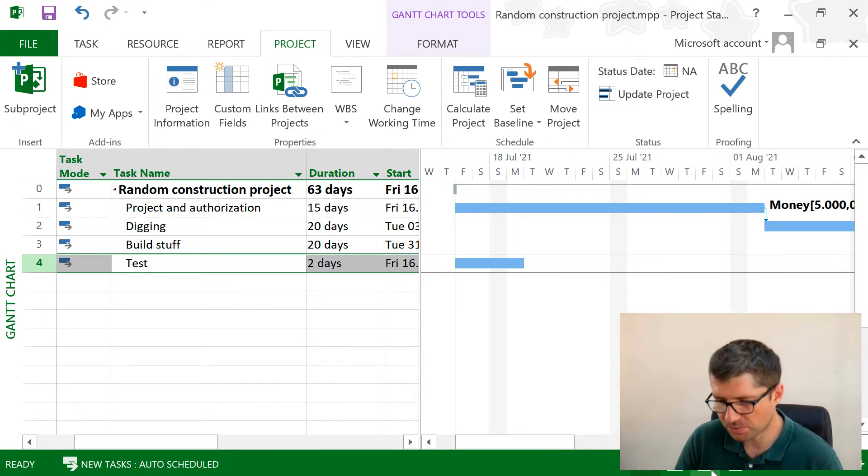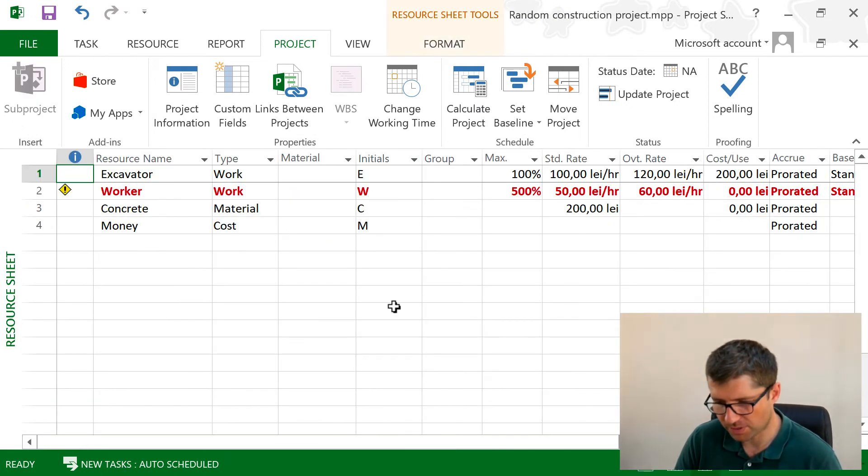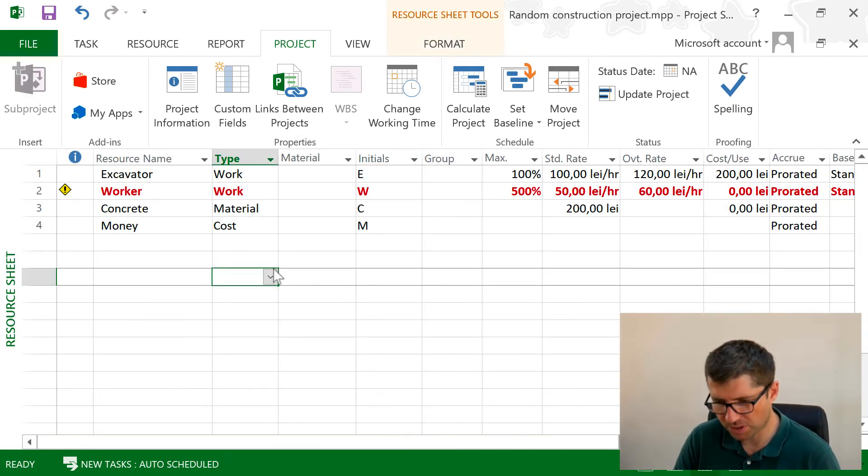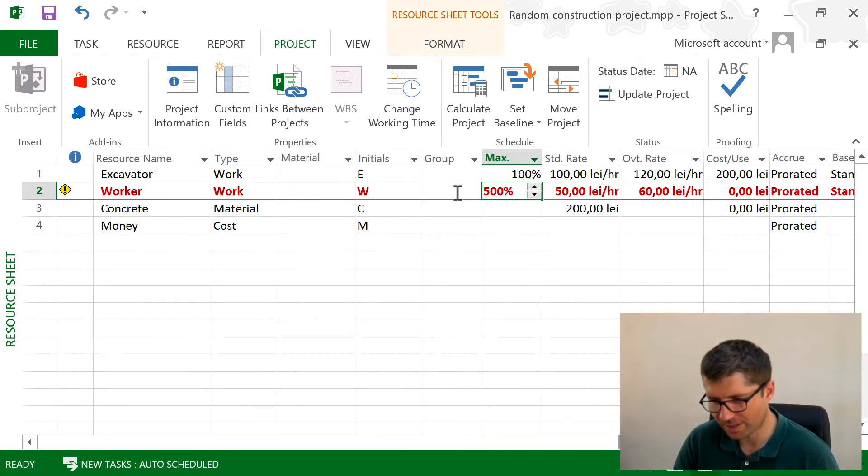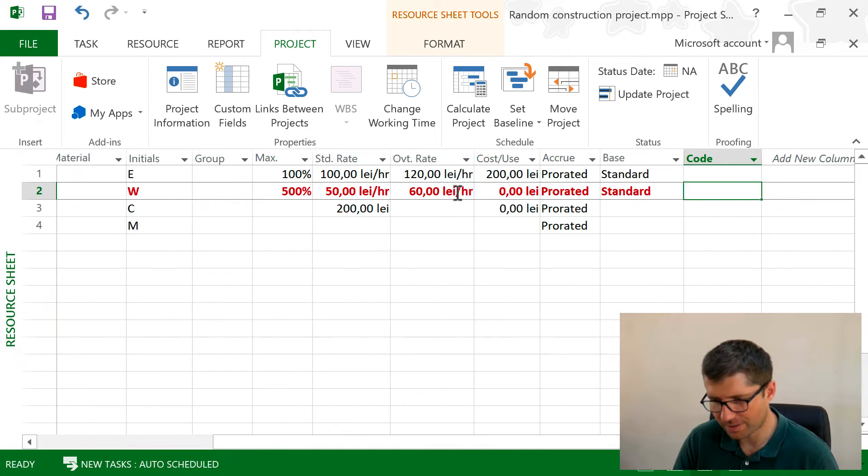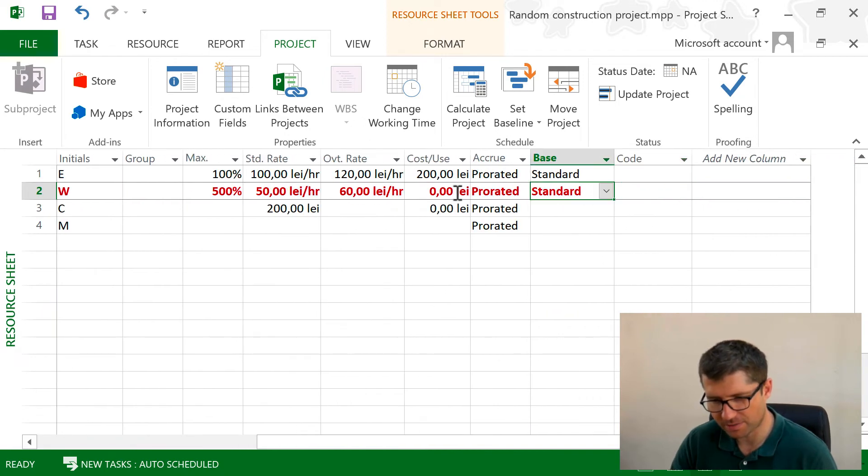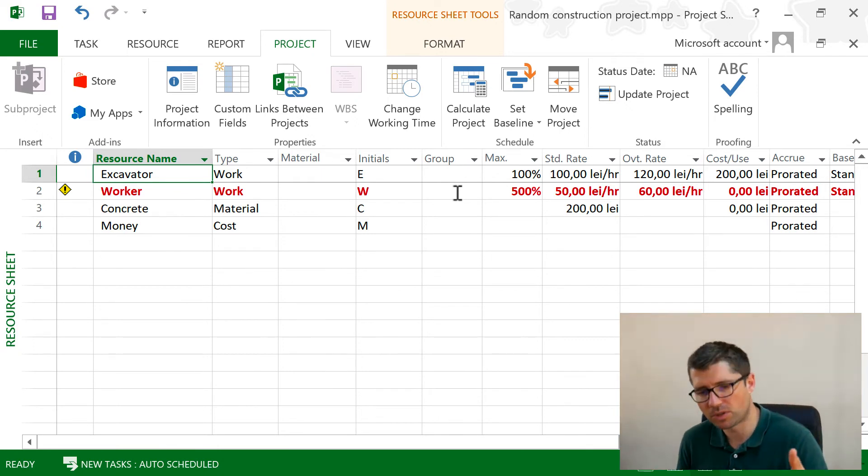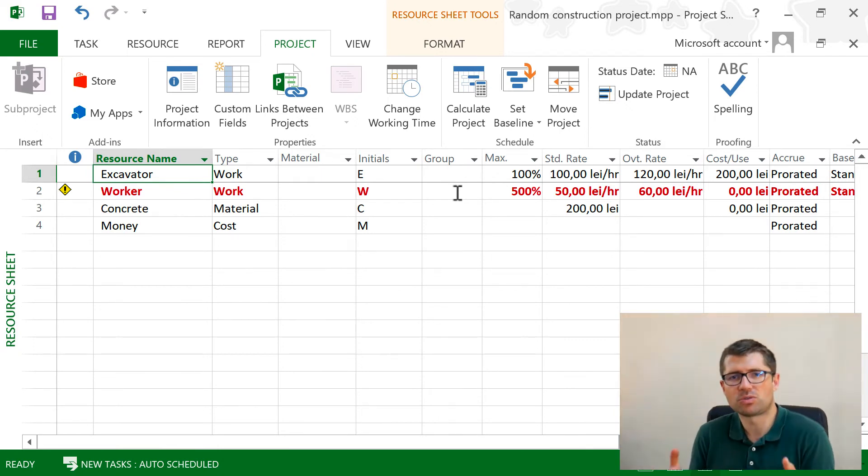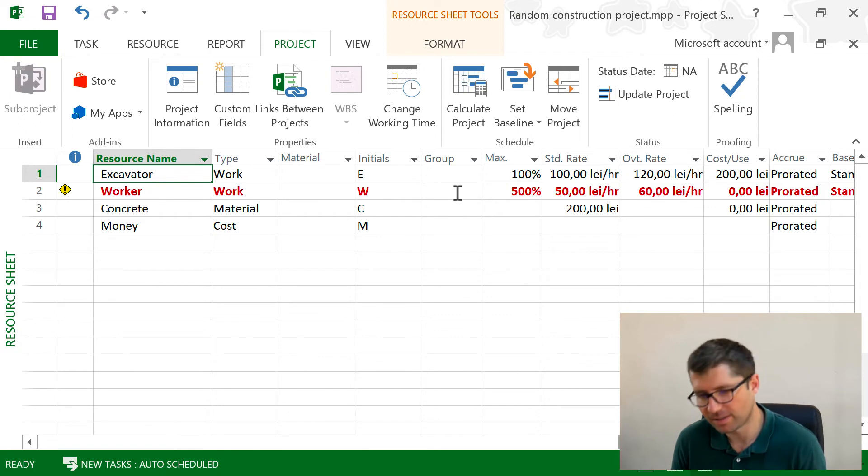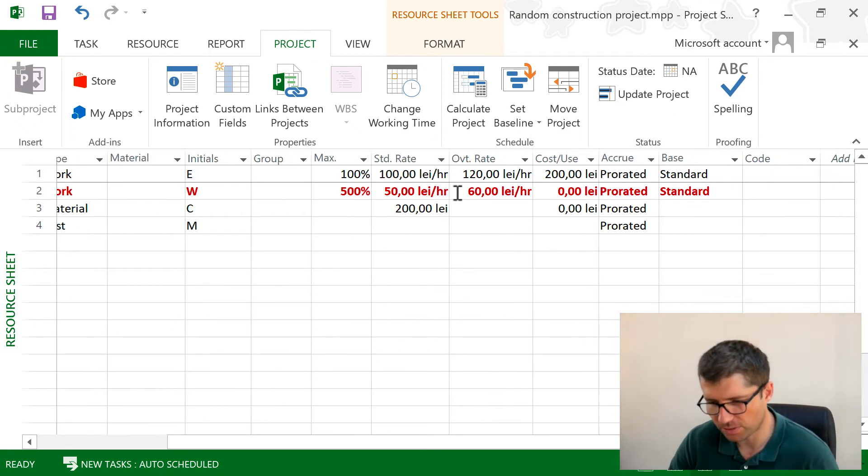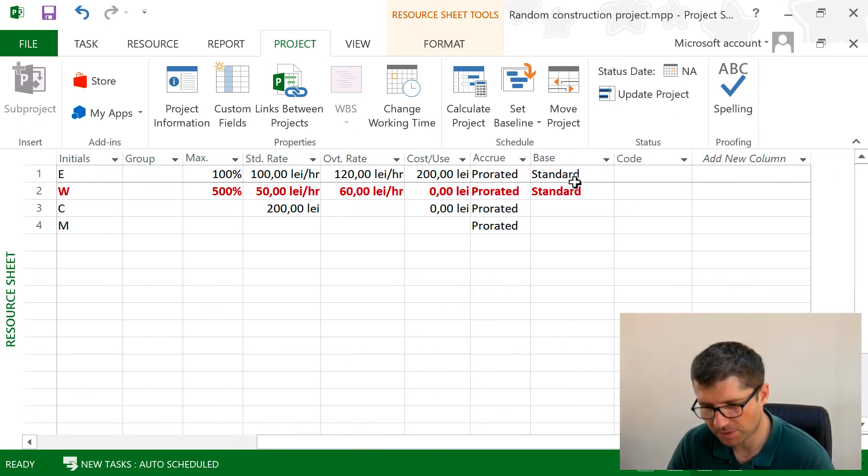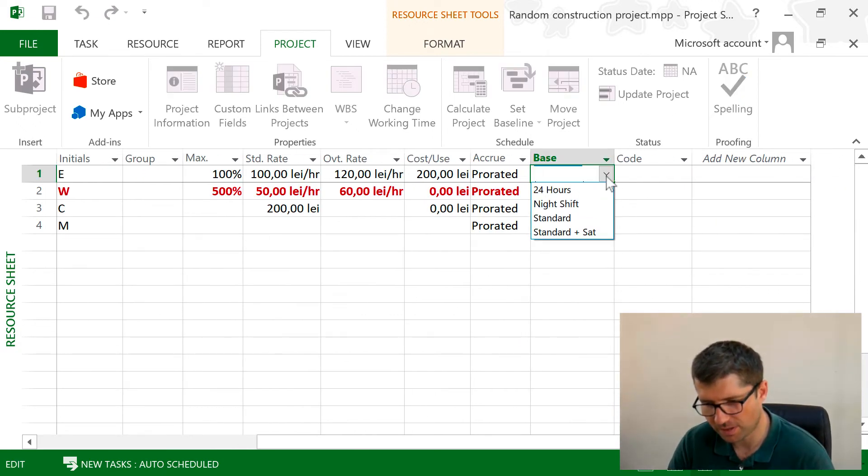This is the same with resources. If I go into the Resource Sheet, I have here the calendar, the base calendar. Of course, this is for work resources, because if I'm talking about materials and costs, there's no calendar to be had over there.